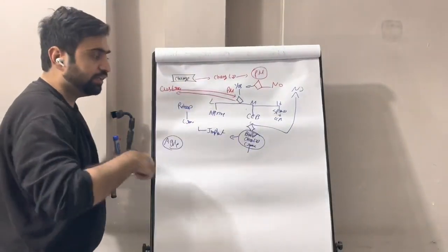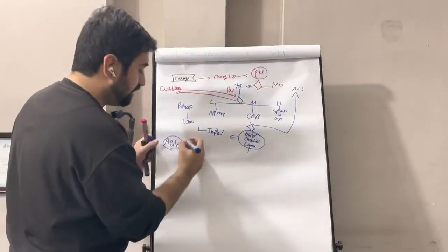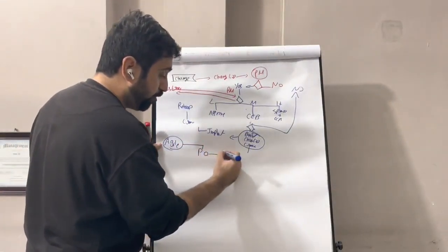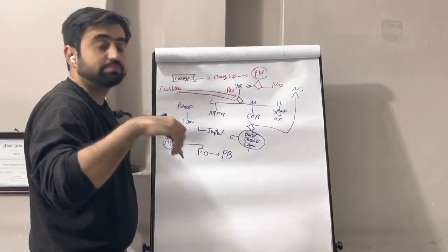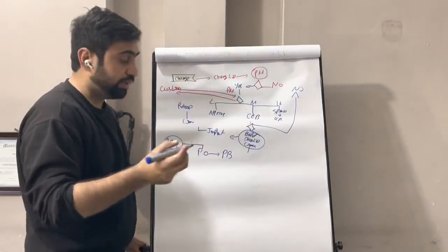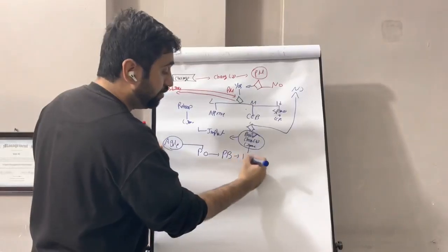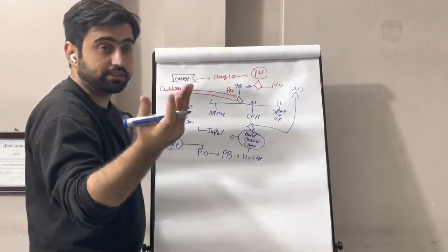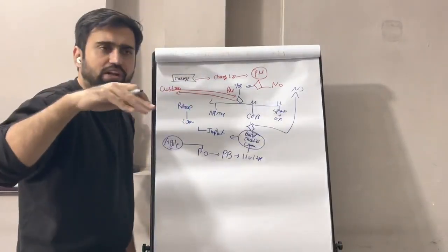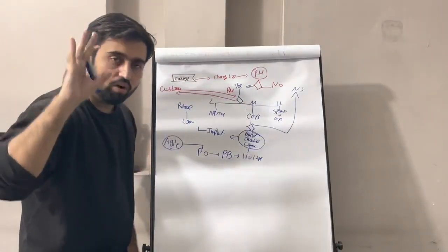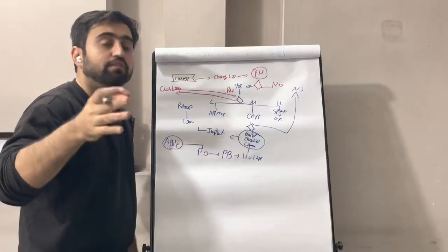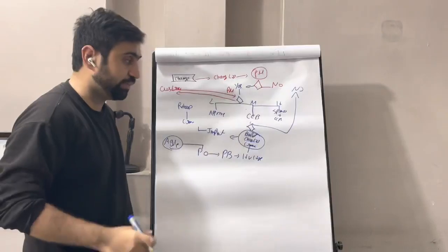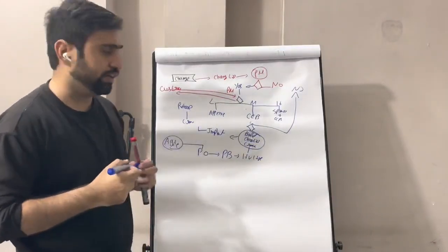So if the change is agile, the change directly goes to the product owner. He puts all the changes in the product backlog, and with the stakeholders and all the people, he rates them as high value, high risk. If that change becomes high value, it is processed in the next sprint. If it is low value, it stays in the product backlog. All the changes must come and we put them into the product backlog, but they are worked according to their priority. Now this is all about monitoring and control.